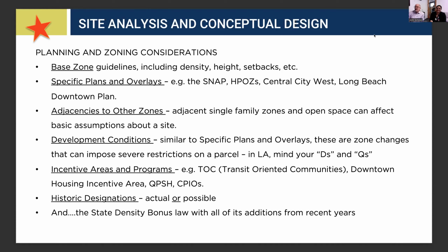Designing in historic districts is difficult because they have prescriptive design requirements. And then we wrote down here actual or possible. I always advise developers, if there is an existing building on the site that is old and cute, be wary. If it's not designated historic, it's probably loved in the neighborhood. And there might be some exposure there to risk of getting appealed or questioned or blocked. So look for historic designations.